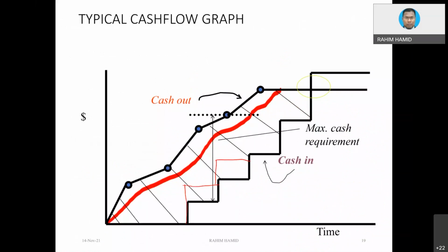That's why at the beginning of the project, you are asked to submit your S-curve. And some of the S-curves look very funny also. The normal S-curve would look like that, but some S-curves would have a bulging impact at the very beginning, etc. So the client might not like this, and the client will ask you to revise your CPM program.